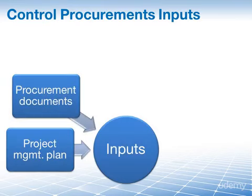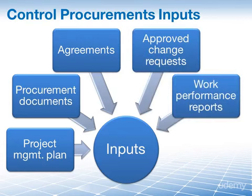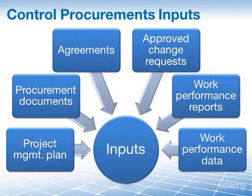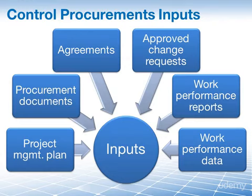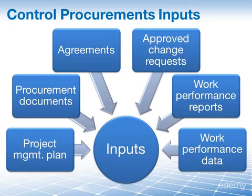The six inputs are: the project management plan, the procurement documents, agreements, approved change requests, work performance reports, and work performance data. Out of these six, there are two we will not look at in detail. The project management plan we need simply to access the procurement management plan, which describes the process of how we administer our procurements — defining step by step what we do in this process. We also won't look at the agreements in detail because, simply put, we need them so that we can control them.